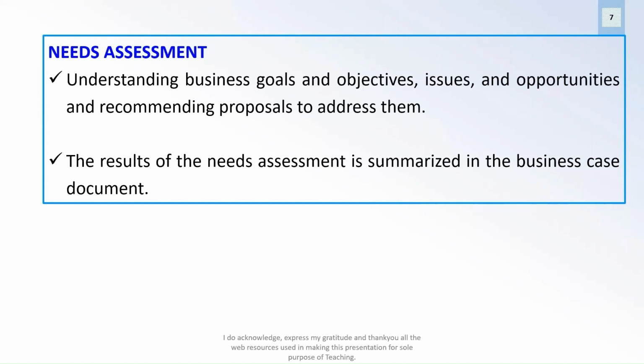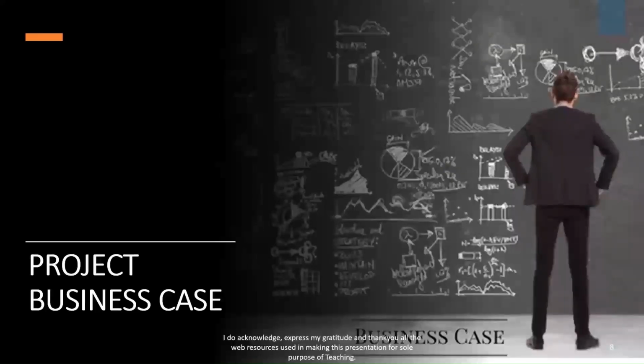Why the requirement exists, correct? That need to be discussed in the case of need assessment when we are doing it. And the result of this need assessment need to be summarized in the business case document, which is the first document being developed for establishing that a business possibility exists.